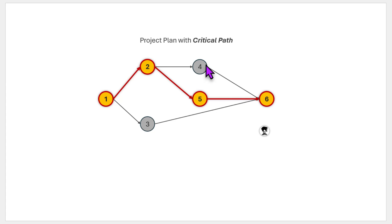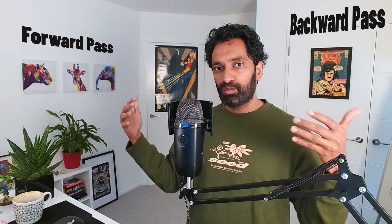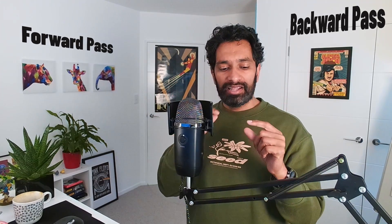This means activities three and four have a little bit of slack or float. They can move around a little bit. They can be delayed or they can have a little bit more duration on them and still not derail the project. So that is the theory behind the critical path analysis. I know all of these numbers can look a bit confusing, but essentially there are two concepts: a forward pass where we calculate the earliest each activity can start and finish, and a backward pass where we calculate the latest each activity can finish and start. Once both calculations are done, we can look for the activities that have zero float or zero slack. That means they don't have any difference between the finished times for earliest and latest, and those are the activities that are on the critical path.